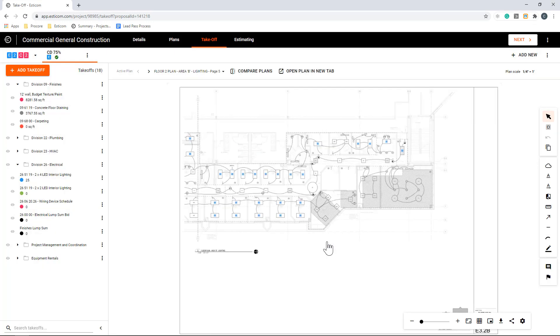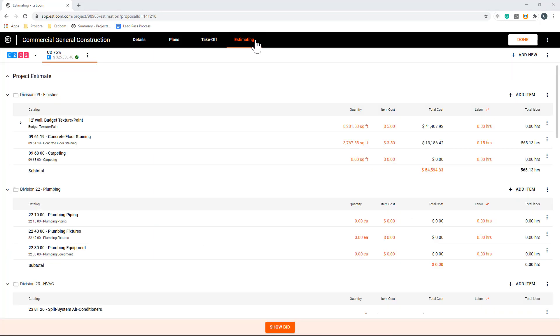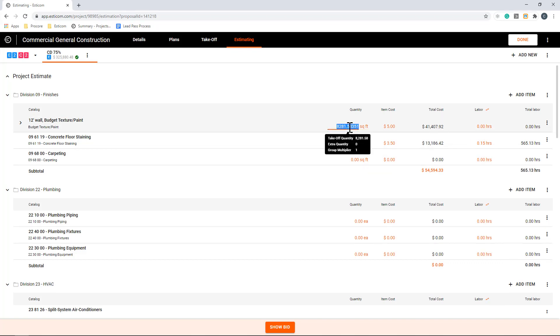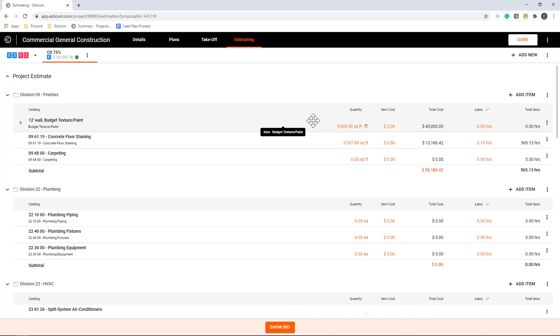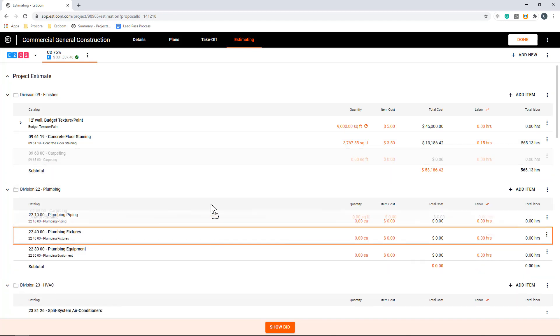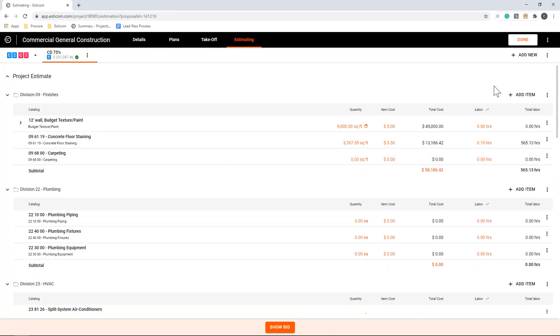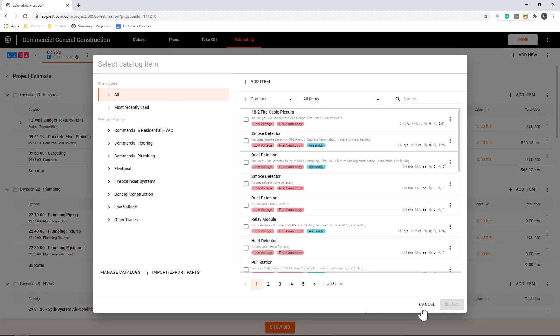Let's move to the estimating tab and figure out our estimated costs for the project. Here we have all of our takeoffs and quantities along with item costs and labor rate in orange with their extensions to the right and in black. You can adjust any number in orange and the extensions update automatically. In addition to adjusting the quantities, item price, and labor, you can drag and drop the takeoffs into groups and add additional items directly from your database or even create non-database items.